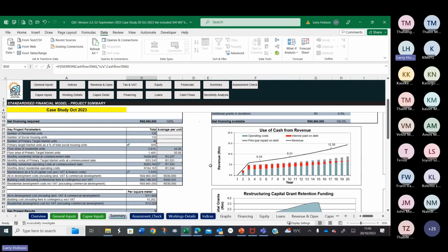But the calculations I did yesterday outside of the quick scan C model showed that we would have a clear difference if we're in SHI between a development cost. It makes a difference of about 60,000 in development cost when we're able to reclaim our VAT.